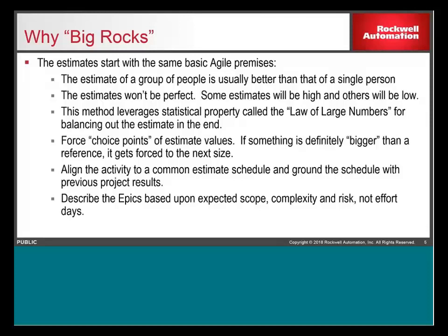And then when you start scoping out the epics or portfolio items, or however you decompose the work, you really want to focus on the expected scope, the complexity, and the risk. Try to avoid jumping into effort days, saying, oh, that's going to take me 2 weeks. Don't go down that path, because one person's 2 weeks is another person's 2 months. So we want to try and avoid that here.